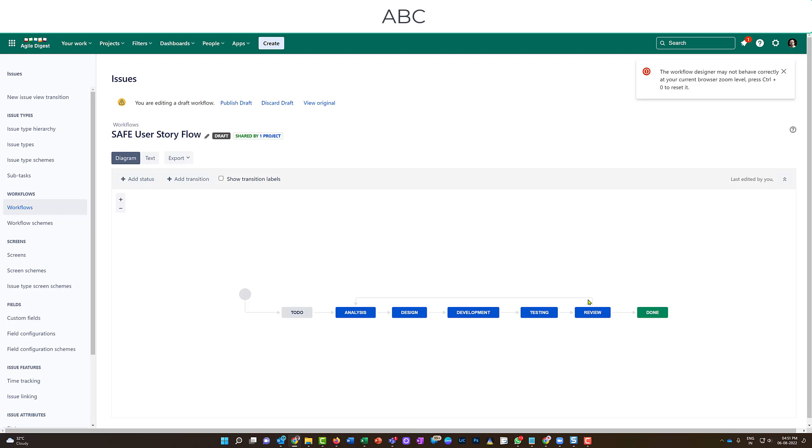Make sure when you're editing it, you're creating a copy of that workflow. Don't edit the workflow directly from the project settings. Why? Because if the same workflow is used by other teams, they will also be impacted.